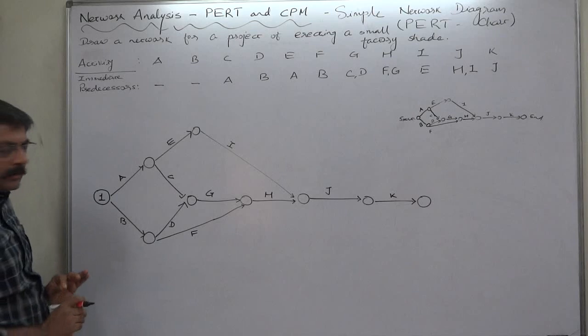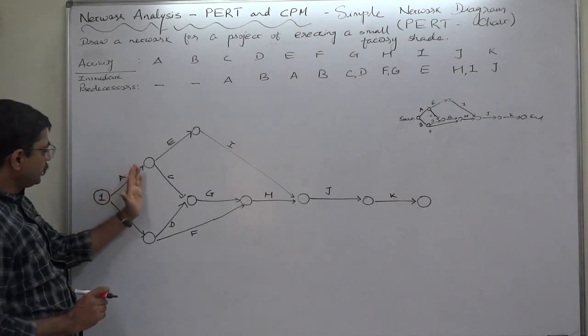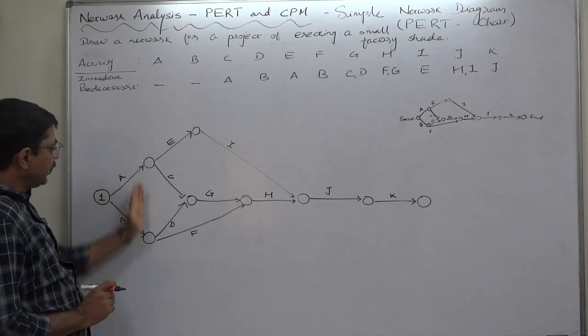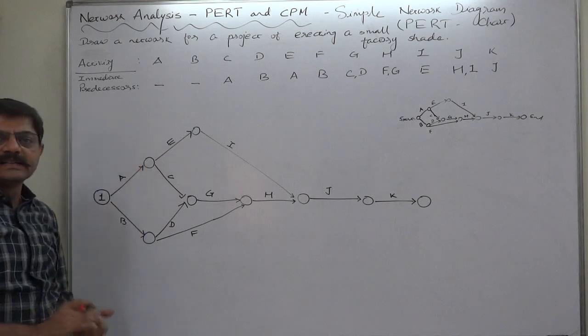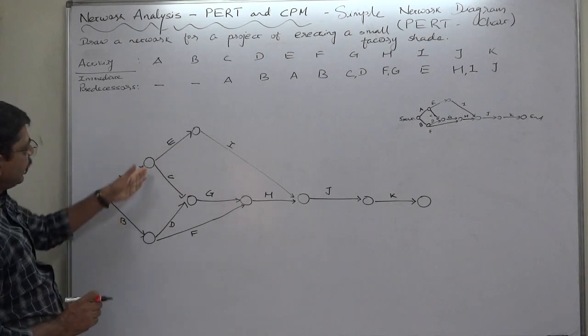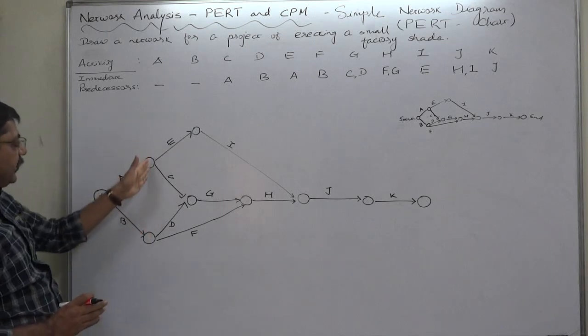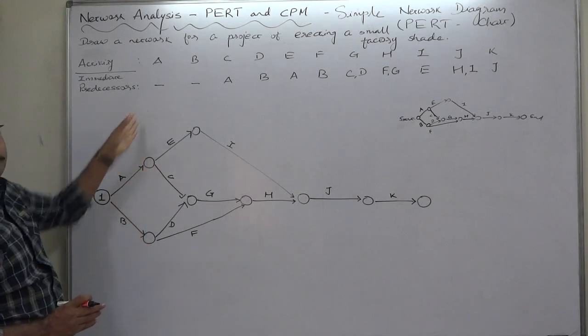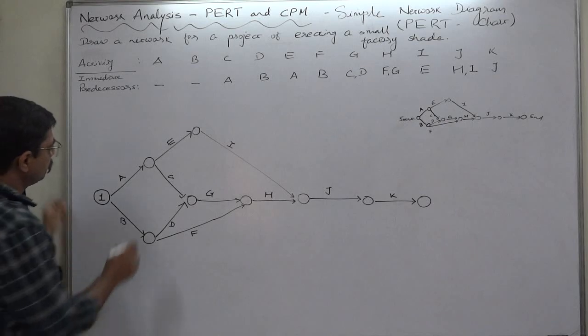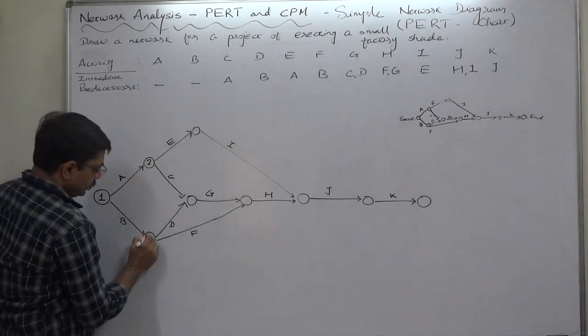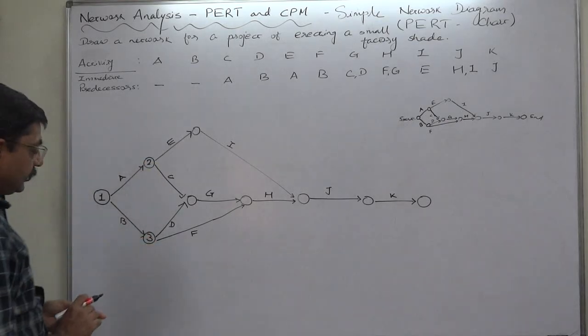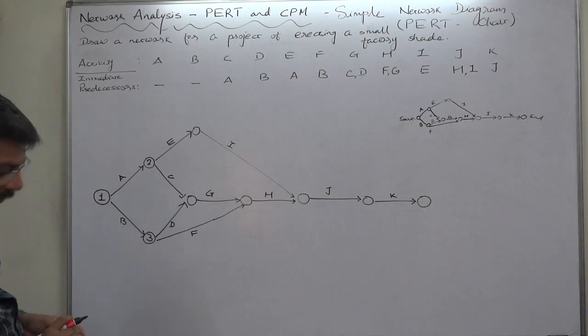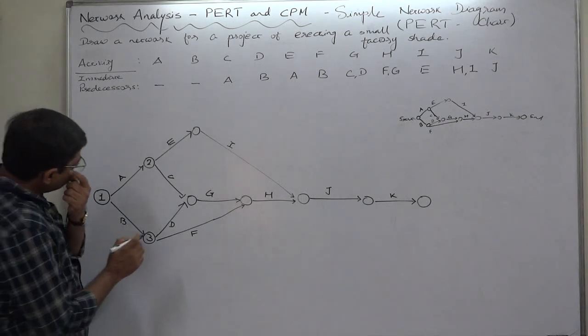First take the initial event, number it one. Now we shall remember that we have already used number one. Now forget all other activities on left side and go to the next level. If there are two or more events vertically, number them from top to bottom. So this must be two, this must be three.